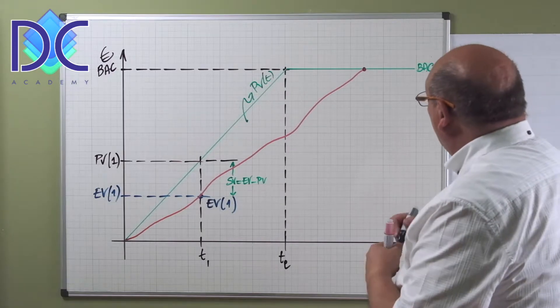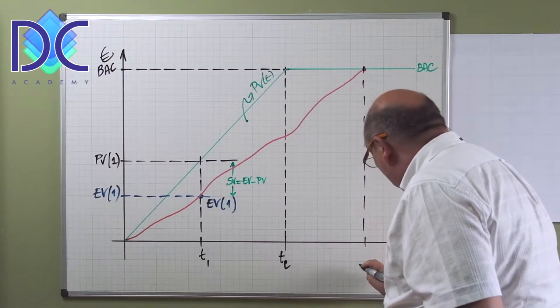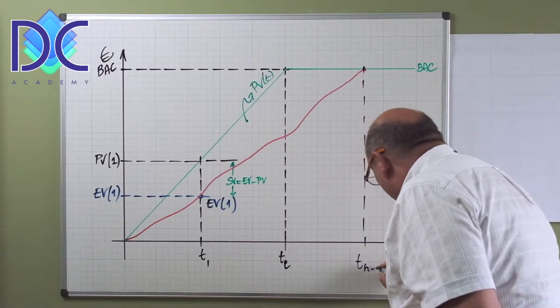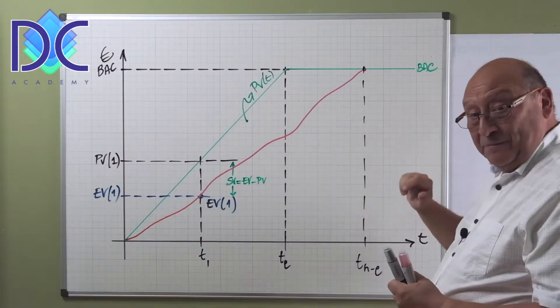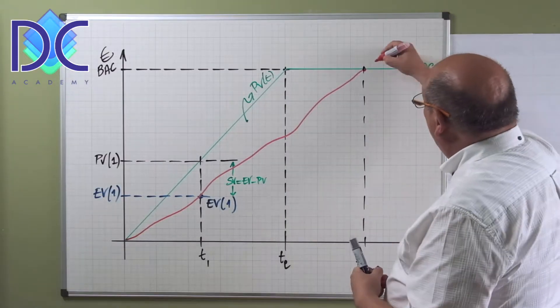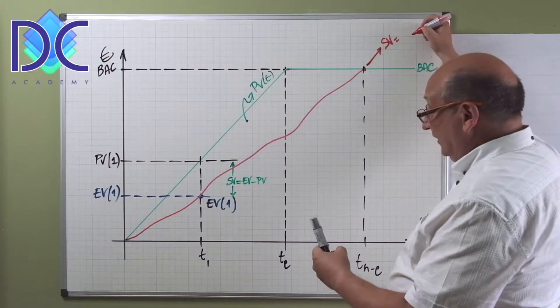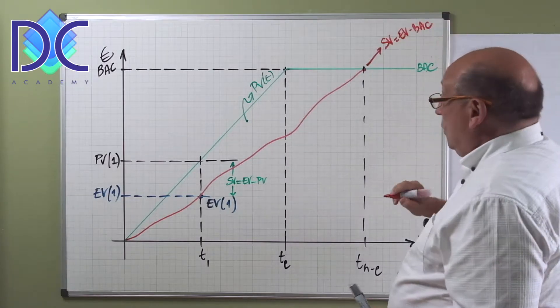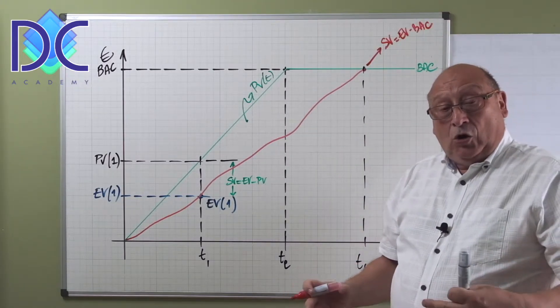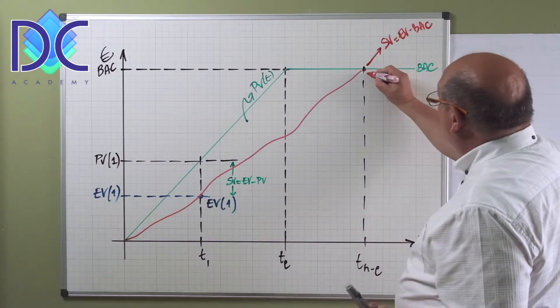Why is this the end of the project? Because here the earned value is equal to the budget at completion. This means that the project is finished, all the work has been completed, and we find a new duration of the project. So we have here down on the t axis t new end.